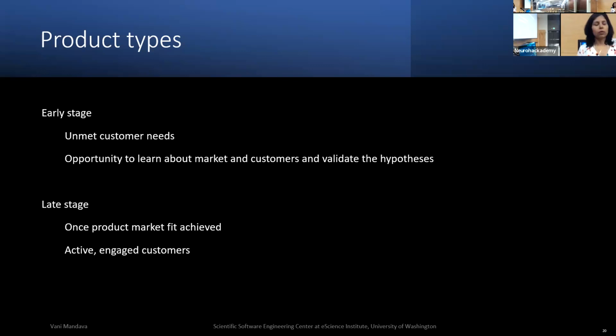Correct. Yeah. No, that's a great question. And this is exactly one of the issues that we are trying to address through the Scientific Software Engineering Center. The way we are addressing this issue right now is at the onset, we create a software requirements document, and then we also create a statement of work. In that statement of work, we work with the PI to identify someone who can be the core maintainer of that software beyond our engagement with it, because we are not in the mode of being able to sustain these software projects beyond helping them build it.